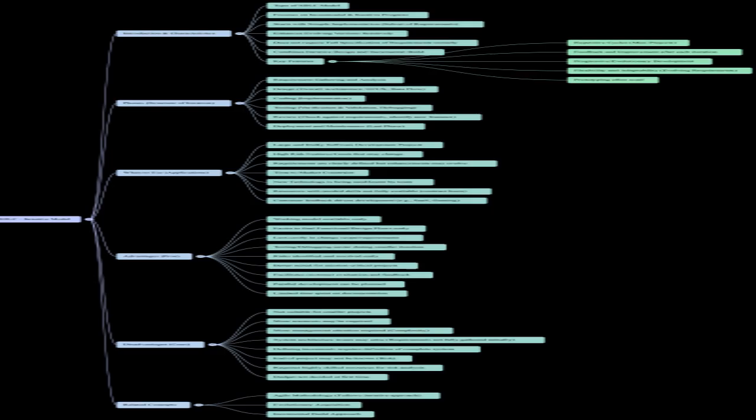Okay. Let's unpack that mechanism a bit more then. If we're developing these small pieces, multiple times, how is that structurally sound, compared to models that demand massive architectural planning right at the beginning? Well, the iterative and incremental approach forces you to combine iterative design thinking with an incremental build process. So you're deliberately dividing this potentially huge project into smaller, much more manageable builds or increments. And this is key: each one of those builds, each iteration, is basically like a mini SDLC phase in itself.